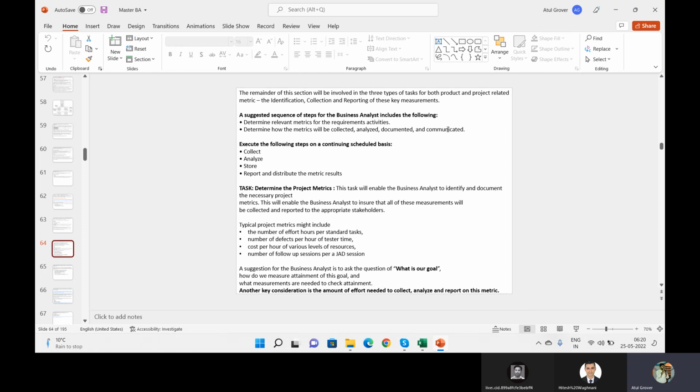communicated. If in the requirement allocation workshop, I know that in 5 days has been gone, only 10% or 15% requirement gathering has been completed, you have to communicate to the customer immediately, so that it should not come to us. So maybe in some companies, like where I worked as a BA, we do this reporting every day.